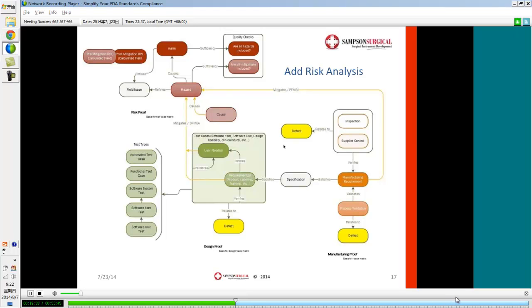I've gotten into a couple audits, one of them with BSI for the ISO side of things, for their ISO 13485 certification. And what they basically said was they didn't want to see a traditional FMEA format for a risk analysis. What they wanted was a harms-based risk management strategy. And so they want you to drive everything in your risk management up to the harm so that, in the end, they can evaluate the impact to the user. So essentially what we have here is another set of link relationships and work items that are associated with the hazards or with the risk management strategy.